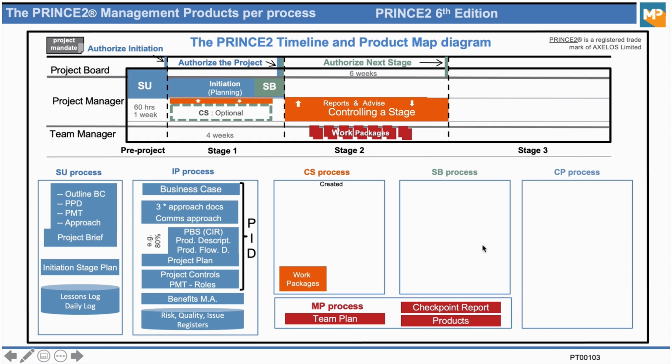All right. And then when they have the products finished, they will hand back the finished work to the project manager. Okay. Now, these products, of course, have to be quality checked by somebody, and the results of these quality checks will go into the quality register. Right. And that keeps happening until all the work has been done in the stage. Okay, that process is still there.